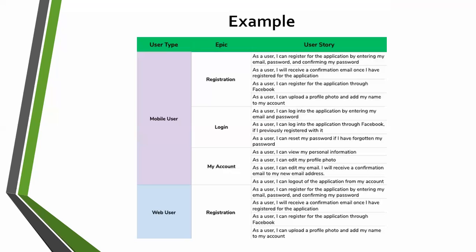Exactly. In that epic there will be various stories. So that can move over various iterations, right? Yes. So it's not necessary that an epic will be delivered as part of one sprint. No. You're going to deliver in the form of user stories itself, not an epic.